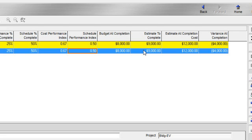When you use CPI in the calculation of estimate to complete, this represents a reliable indicator of the minimum required total costs. And it's typically viewed as the most optimistic the project will do based on the history so far.